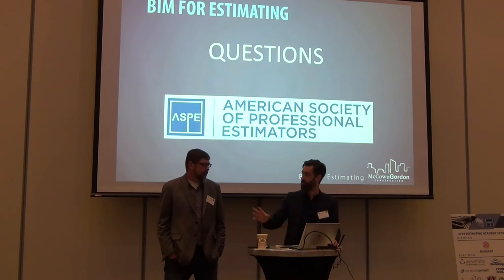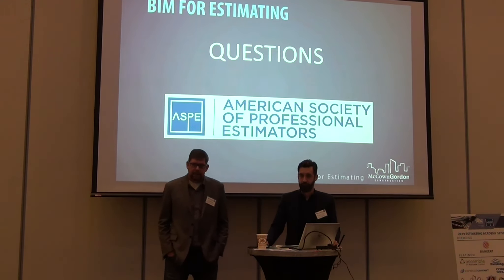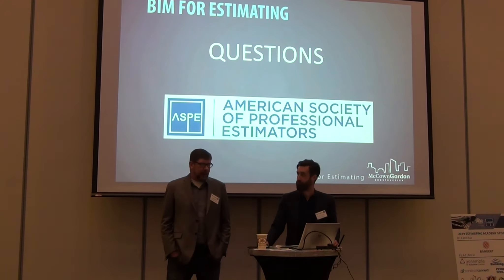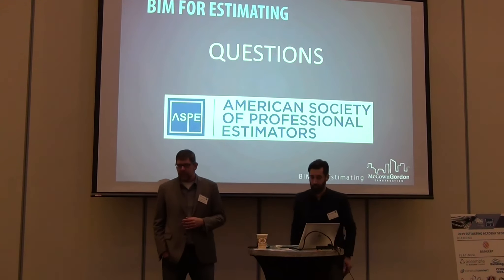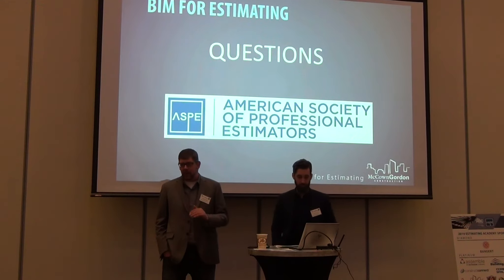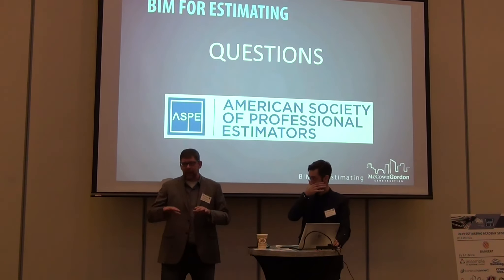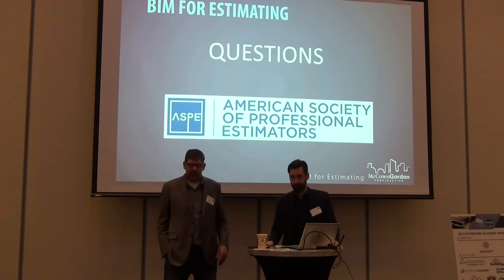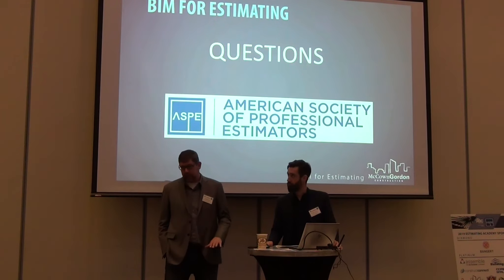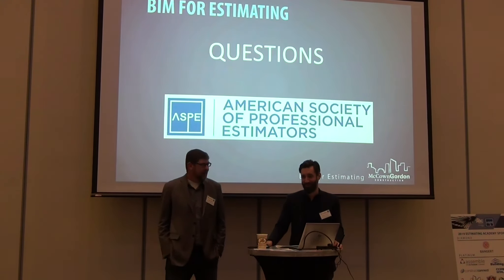From an MEP perspective, are you seeing electrical models come in, or are engineers still using more 2D? They're coming in, but not as soon. I usually won't see my first MEP model until midway through the design development phase, and they update less frequently. They won't update lighting layouts every time a ceiling changes. On a project where I had 18 architectural model versions, I might have had only four MEP versions. MEP models have more line diagrams representing conduit lengths and routing — it's more about fixture counts than detailed routing. Revit did start as an architectural tool and the MEP side was less capable, but it has developed more and more.